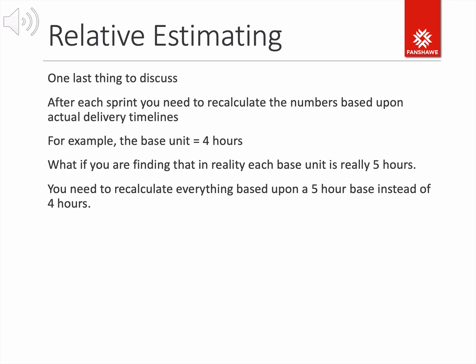So keep in mind that we leave it in story points so that if for some reason we've done a very bad job of estimating our story points, we simply have to go and change what one story point equates to in terms of time and money, and then we can recalculate and reproject the cost and time for the system. So now that we know how long a project's going to take, by just simply looking at the product backlog, we can now create a baseline estimate that can be included in a vision document. So this is the basic math behind that.